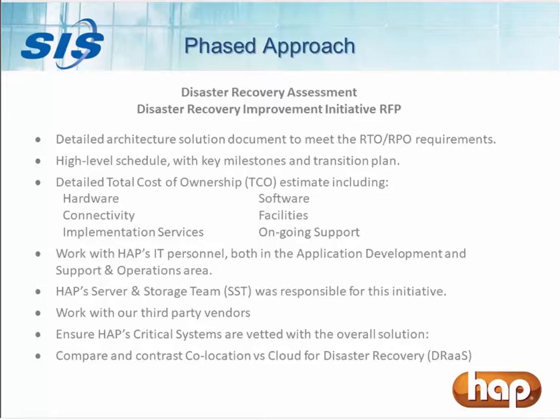We needed to keep it below what it would cost for us to locate our own equipment with our parent company. I think we started out with approximately 8 or 9 candidates and narrowed it down to 3. And then we went through a blind scoring process. Quite honestly, I've never seen an RFP of this size scored this way. We actually had a board that was comprised of folks from HAP and Henry Ford, and SIS was actually selected unanimously across both organizations.